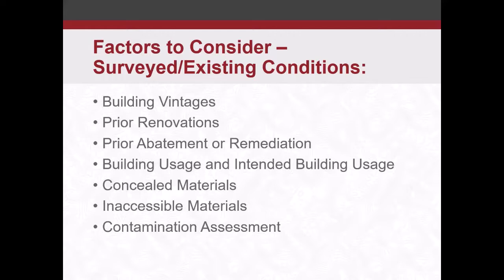Let's just remove those walls as an abatement project. And if there is insulation, you already have containment up, so you can remove those materials under abatement. Everyone's happy. If there aren't any materials, you could just tear down your containment and everyone else can go about their work, and again, everyone's happy. So account for your concealed materials, even if you don't know specifically whether they're there or not.